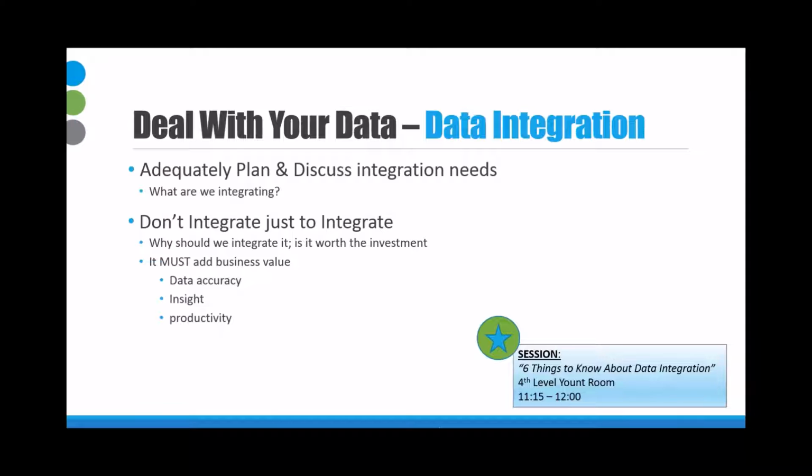And then the next piece, don't integrate just to integrate. You should have a very valid reason why you're integrating the systems, and is it worth your investment? Oftentimes, as I mentioned before, integrations are areas that can be very time consuming. So you want to make sure that it really does add business value, whether that be greater data accuracy, greater insight. So possibly, salespeople commonly don't have access to ERP data, but maybe sometimes it's very useful for them to have that data, but you don't want to give them licenses to your ERP system, so let's expose some of that data in the CRM system. Does it provide productivity? So really just making sure that it adds business value.